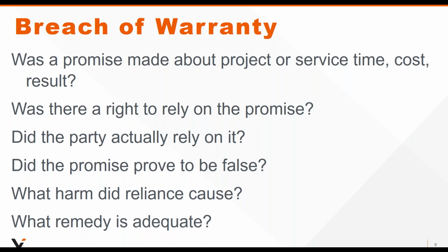This is very typical in the construction arena, where the contractor, the builder, actually does promise as part of the bargain for exchange that they will warrant that the construction will happen, that the completion date will be met, and that indeed the client can rely on these warranties being met. And if they don't, that they will make the client whole. So that's very typical in the construction arena.